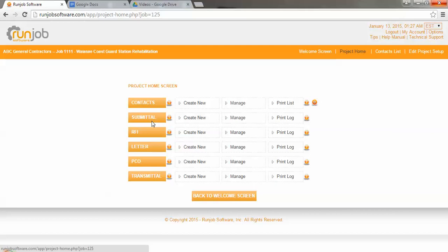The other things that it does is submittals. Submittals can be entered in a log and tracked through the receipt from your vendor or subcontractor all the way through the submission and eventual approval from your owners or your clients. Requests for information is just that. It's a request you're making to your client or owner asking a simple question on the job, clarification on a detail or a spec, whatever it may be.